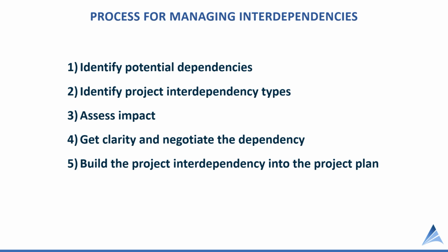Now, some people are going to be tempted to create a task dependency, a hard dependency in their multi-project scheduling tool, if that even is feasible with the tools that you've got. This can introduce confusion into the scheduling. If one project delays or has a schedule slide, it could inadvertently affect the other project's schedule and it's less clear.